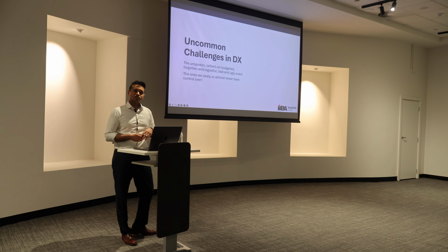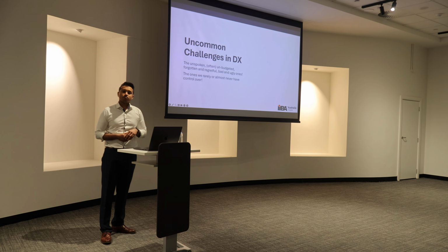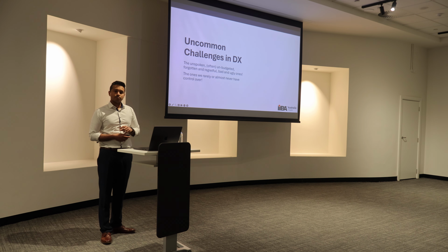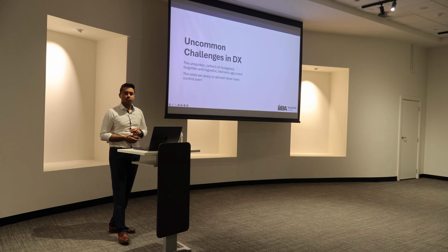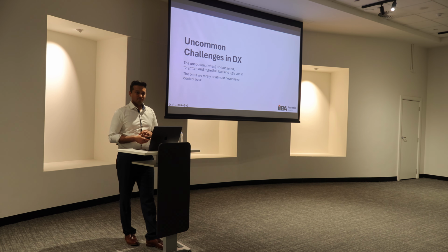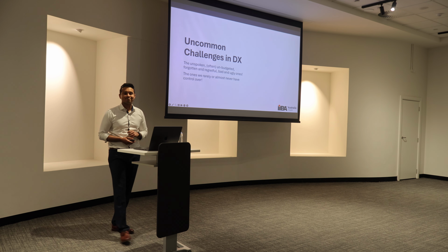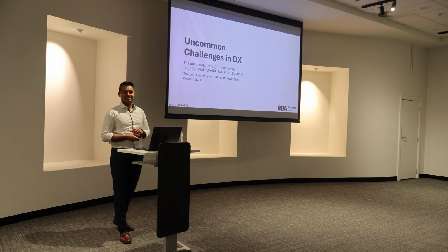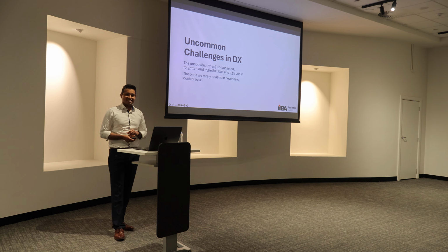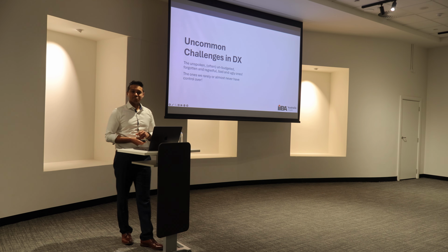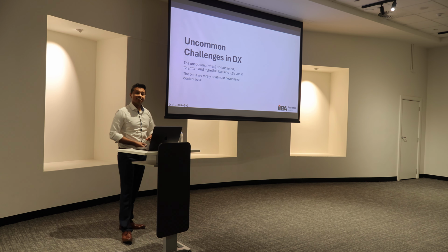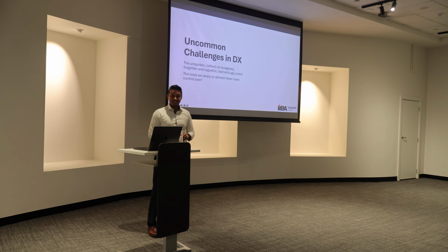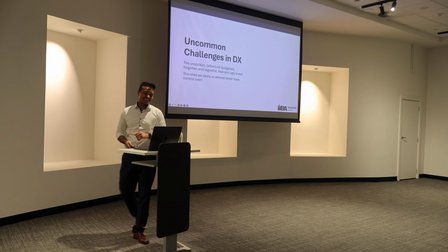Not sure if it's the same, but stakeholder engagement. Yeah. So essentially at the beginning phase, they're not as engaged. They just say very high level stuff. There are nuances that are missed, which end up being scope creep later, and then maybe during sprint demos they don't join, so they don't really know what's being built. And you end up with a product that is not what they expect at the end. And then in QAT, or if they attend UAT, yeah, once it's gone live, they'll blame you for it. Good. Right? Yeah, good one.